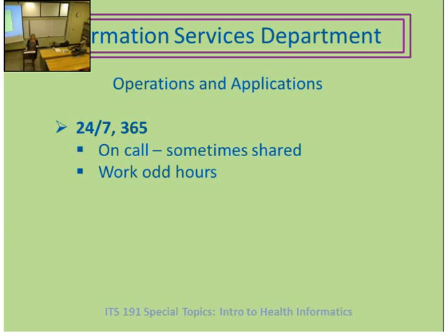Right now we have some critical NICU babies, and they're talking about doing some downtime to do some stuff that affects our neonatal intensive care unit. They can't just do that. These babies are events. We either have to really prepare to make sure everything is on generator backup and ready to go, or they just postpone it. How critical is it for what they need to do? Can they wait a couple weeks, or do we need to do it during the day when there's more staff, and how does that impact the rest of the house?